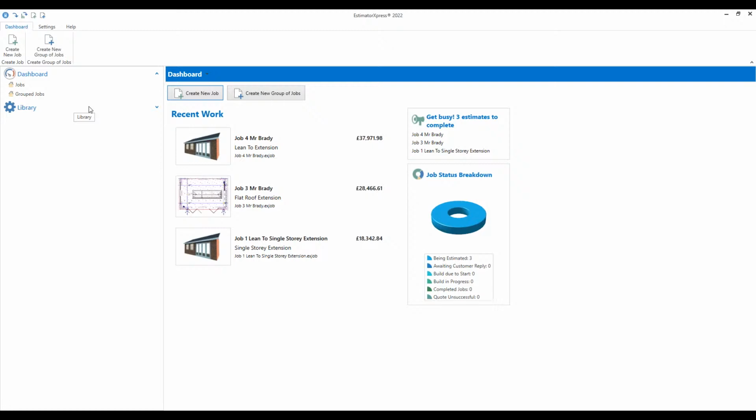So if there are deadlines, the customer wants a quote tomorrow, you can give them a nice ballpark figure, maybe make the shortlist, and then you can give them a nice detailed one with a lot more information. But at least you know up front whether the job's even worthwhile tendering for in the first place. You could find that you're not going to make much money on it, so there's no point putting all your efforts into it. At least you're knowing that answer very, very quickly, rather than it taking 2 or 3 days, or, with some builders I speak to, a couple of weeks to put an estimate together.